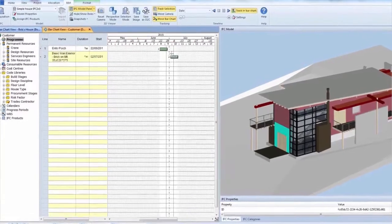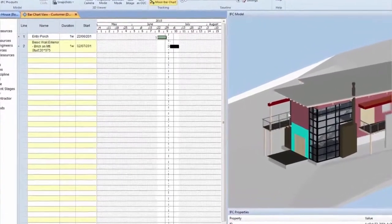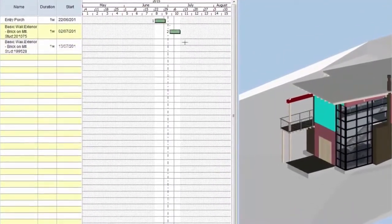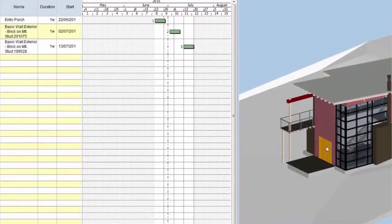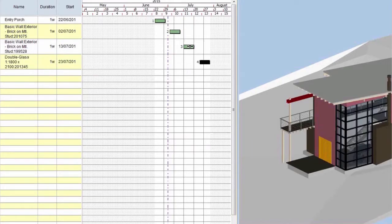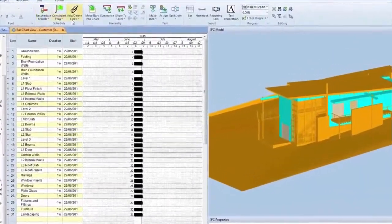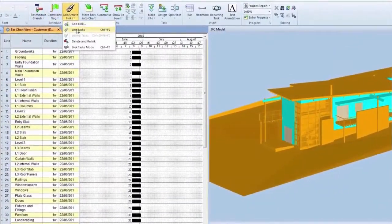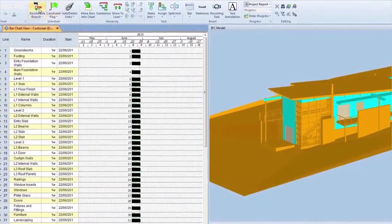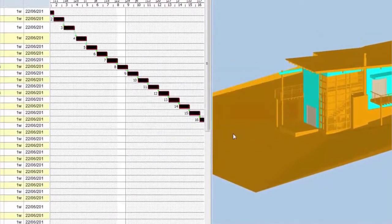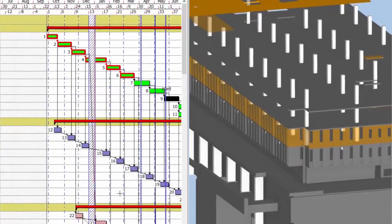You can quickly create schedules directly from a 3D model by just dragging and dropping objects between the 3D view and tasks. You can also use structured templates with predefined searches to automatically link to the model objects.